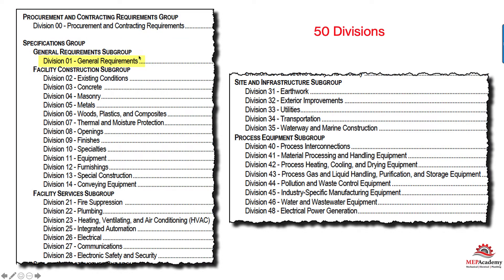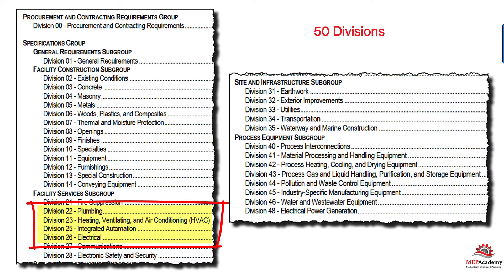We'll go over some of these later, but you'll see the different trades listed. If you do Concrete, that's Division 03. If you do Masonry work, that's Division 04. And then we get down to our MEP trades. Division 22 is Plumbing — always Division 22. Division 23 is Heating, Ventilating and Air Conditioning, known as HVAC — always Division 23. And Division 26 is Electrical.